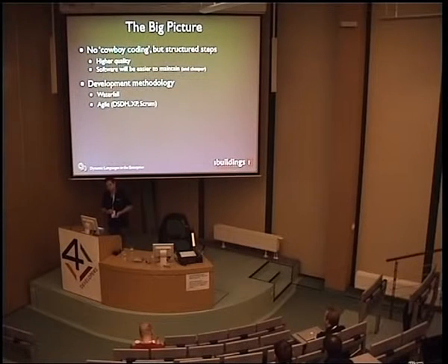If you run into those problems, it's really useful to look at agile methodologies, and DSDM, XP, and Scrum are just examples of those. But agile methodologies basically say, hey, don't work with a waterfall model, but work iteratively. Do a small bit of design first, a small bit of architecture, a small bit of application development and testing, and then you do that iteratively in cycles.